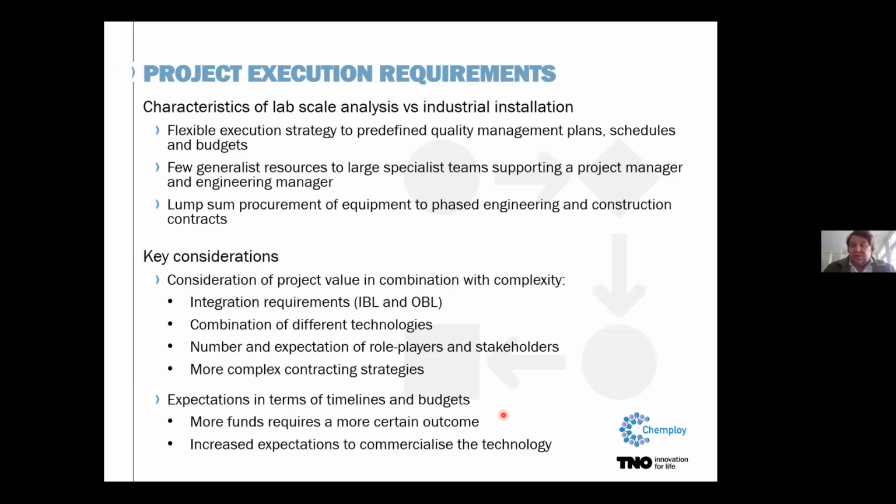So again, what are the key considerations? You need to consider project value and the combination of the complexity. Of course, there are aspects associated to the integration requirements. When looking at the complexity of your projects, you need to consider how many different technologies you're trying to combine, and the number and expectation of role players and stakeholders. The more stakeholders you have, the more overhead you're going to spend to keep everybody abreast of what they need to know and to manage those expectations. And of course, you have more complex contracting strategies. Associated with that, on the other side, are the expectations in terms of timelines and budgets.